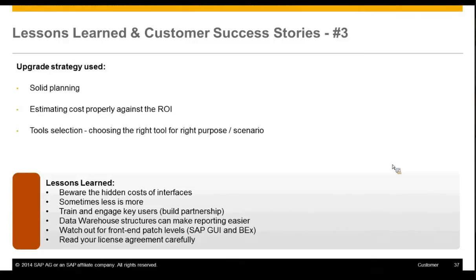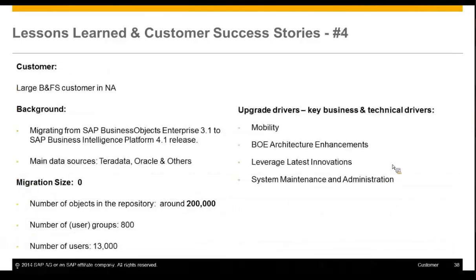They will keep asking about it. They were very particular about documenting what the hidden costs are. If I'm planning for 5 consultants, do I have to plan for another 2 consultants in case I have more challenges? For things like that, they were very particular about understanding the process and the cost associated with it. They were very successful and very happy at the end, but it took a lot of planning, discussion and review before they could even start the first wave of their migration.